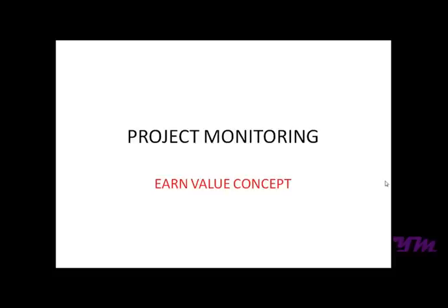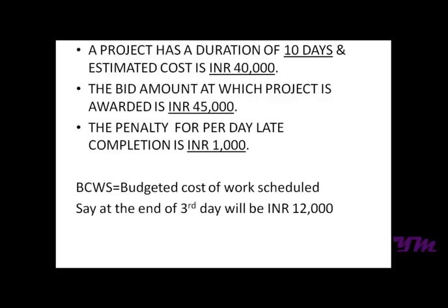Module 13, Project Monitoring using Earned Value Concept. Now say you have a project with a duration of 10 days and an estimated cost of 40,000, and the bid at which the project was awarded is 45,000, and the penalty for per day late completion is rupees 1,000. So the profit margin over here is rupees 5,000.